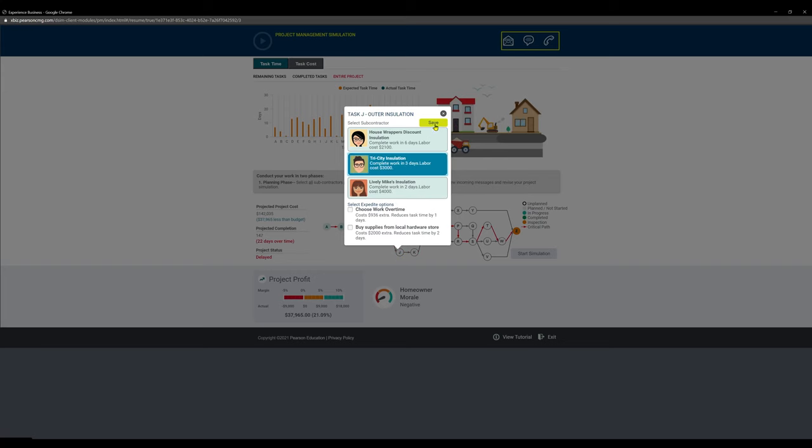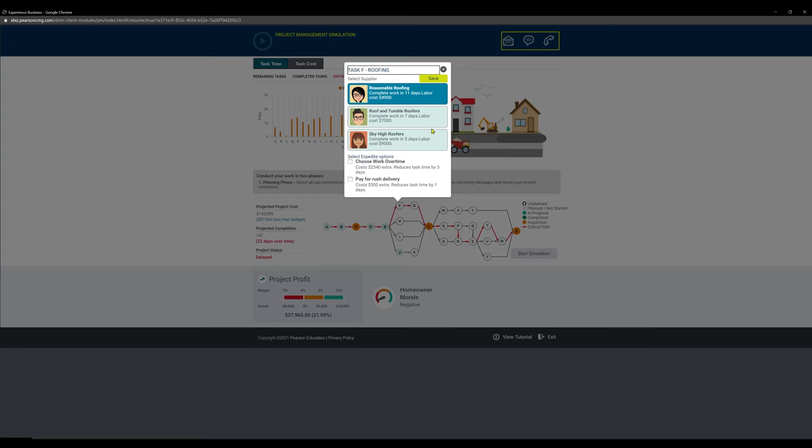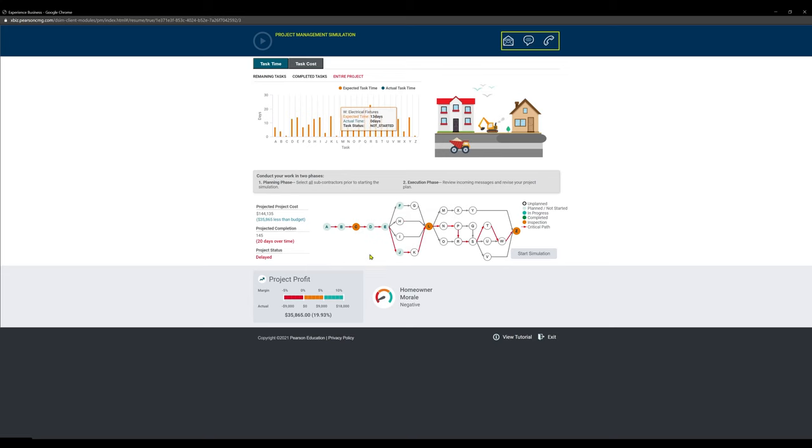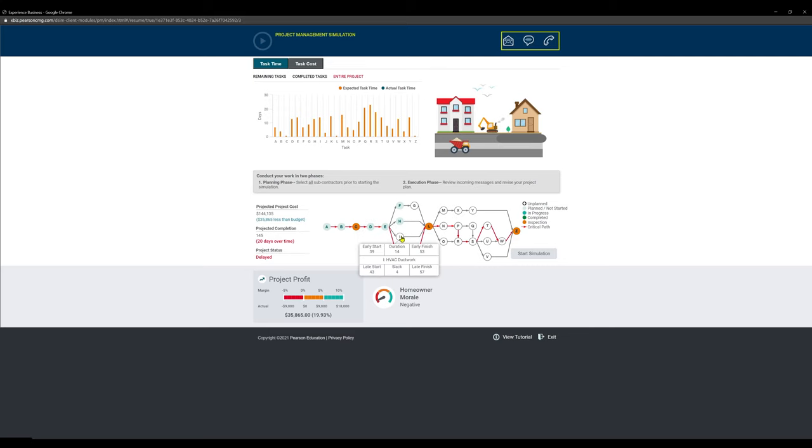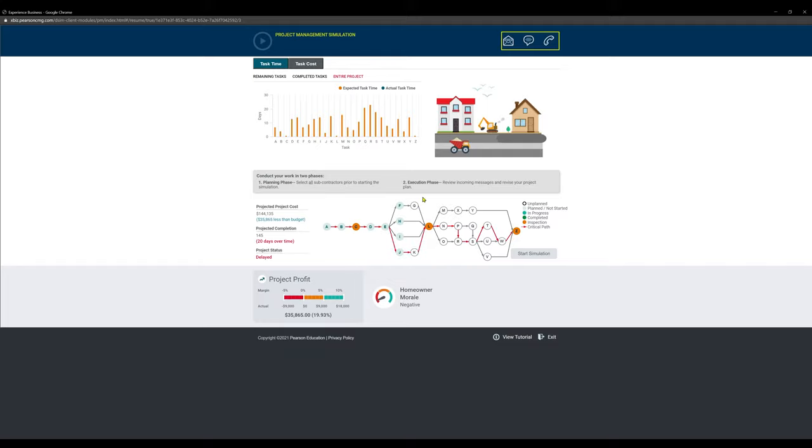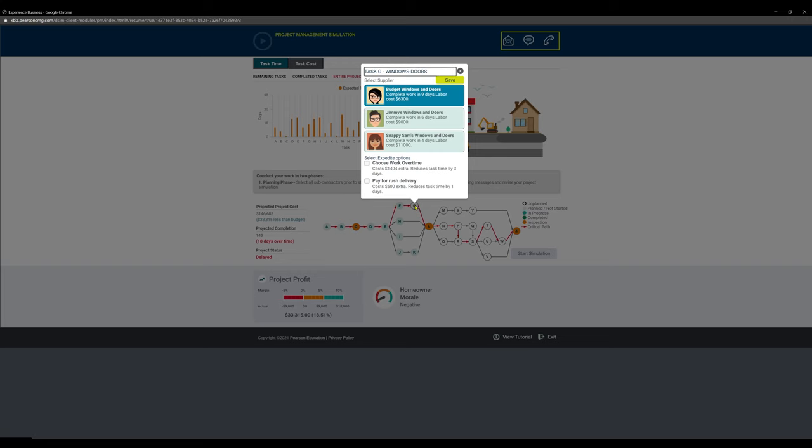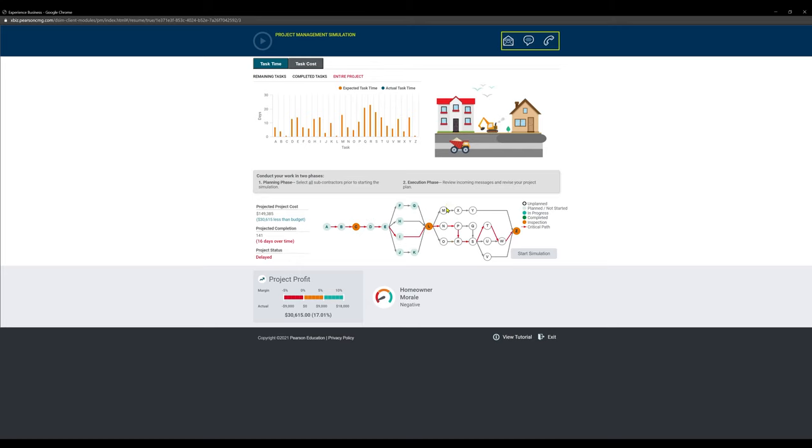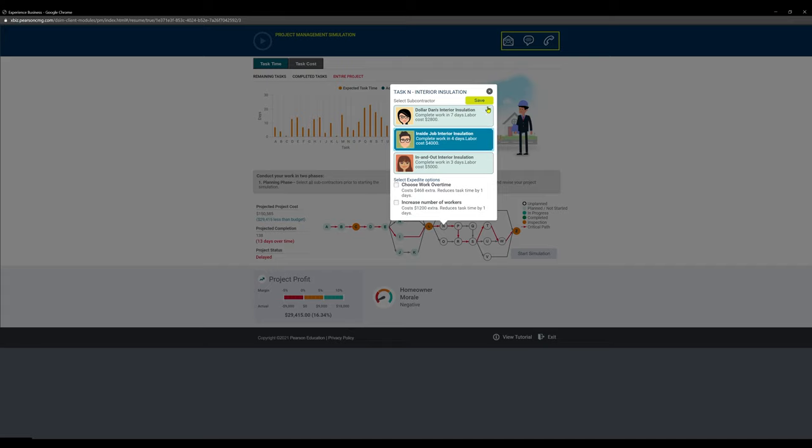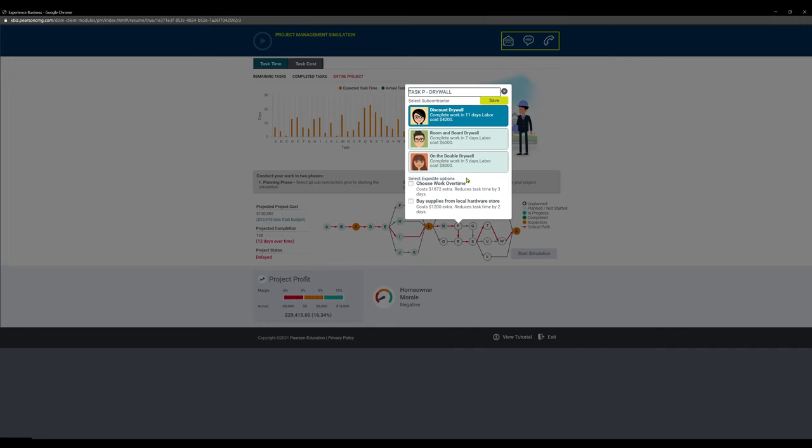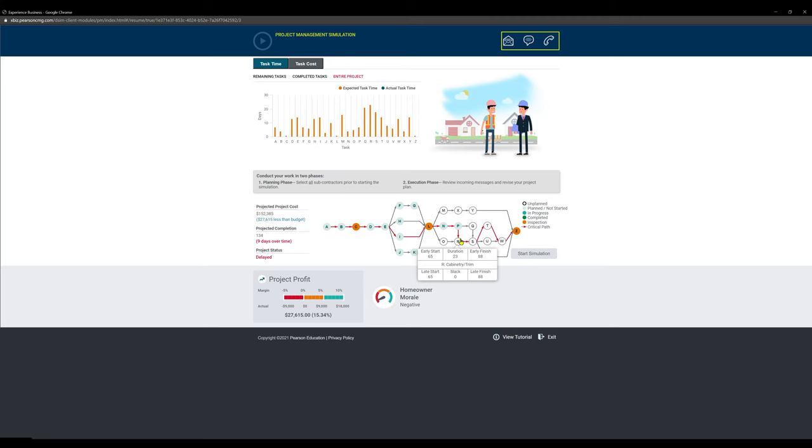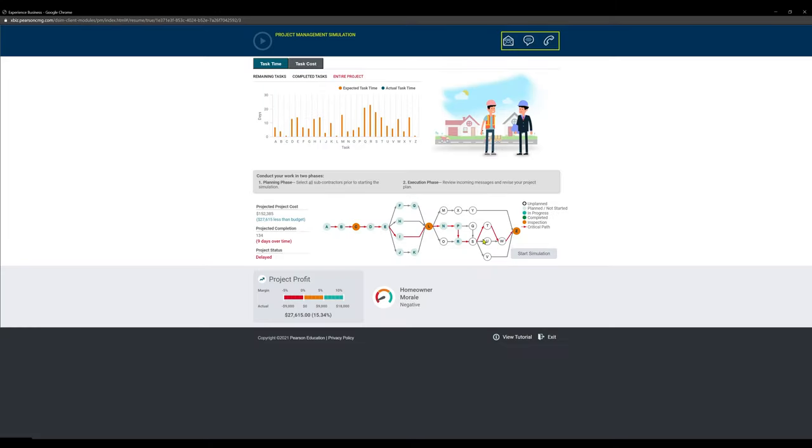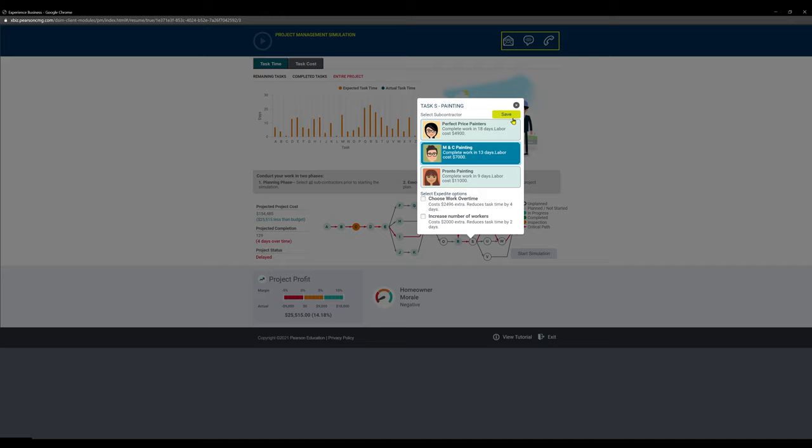We're going to pick our second guy here for F, second guy here. Now, H and I, they're not critical steps, as we can see. So we're going to pick the first guy. Cheapest option is the best option. Let's go to K, pick the second guy. G, pick the second guy. N, we're going to pick the second guy. P, second guy. R, second guy. And S will also be the second guy.